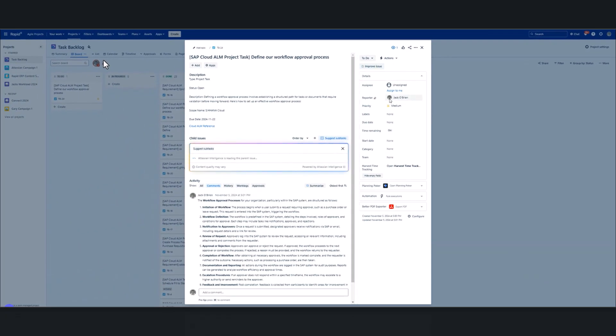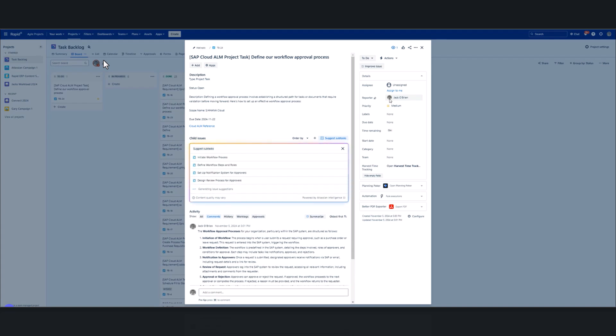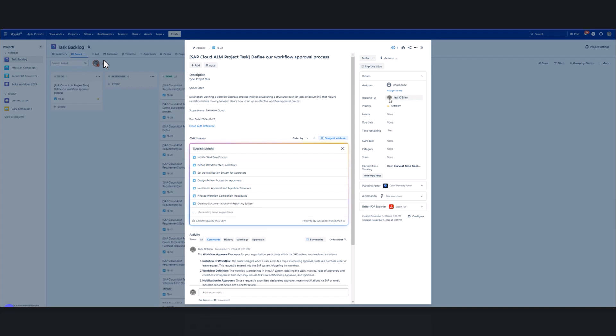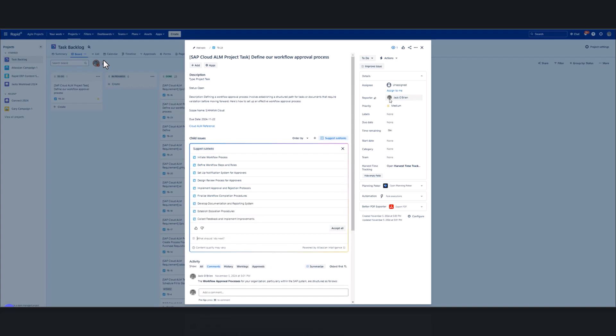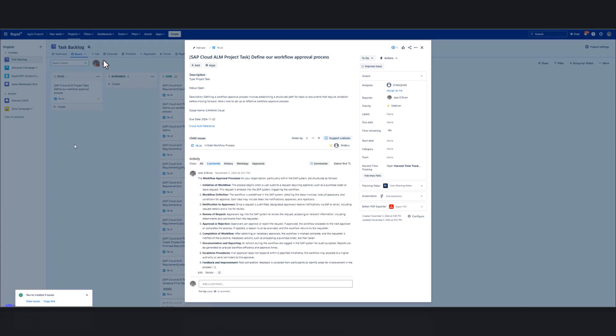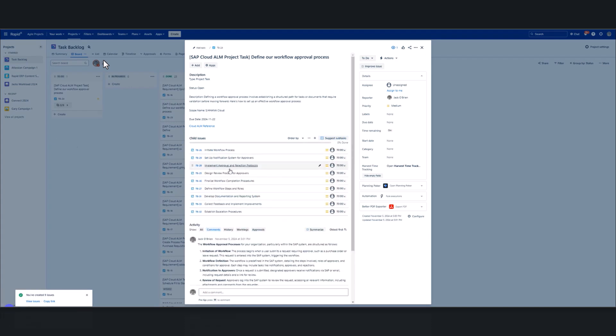As we often know, this high-level task to define our workflow approval procedure will generate more tasks. So Jira intuitively is going to read all the information in the ticket and create some child issues for us, some subtasks, essentially. So it's done that for us. We can go ahead, edit those if we need to, or we can go ahead and accept those, which we can do now. As you can see, with a few clicks, we've answered our initial query in the task and we've created some subsequent subtasks.